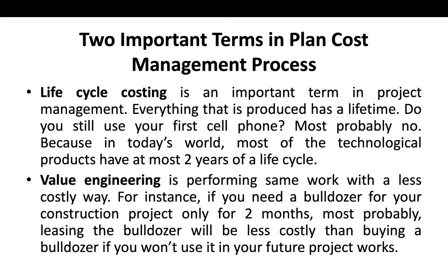Second thing is value engineering. What is value engineering? Value engineering is performing the same work in a less costly way. For instance, if you need a bulldozer for your construction project only for 2 months, most probably leasing the bulldozer will be less costly than buying a bulldozer if you don't use it in your future project works. So value engineering means do things smartly.